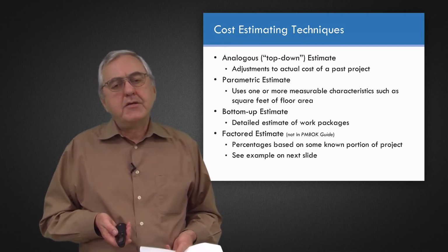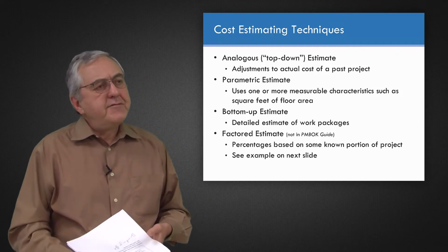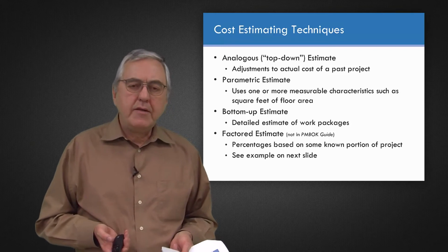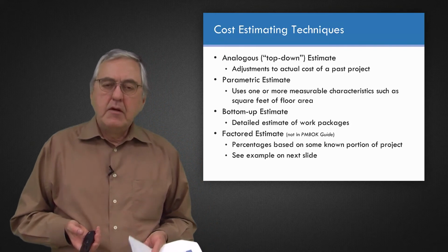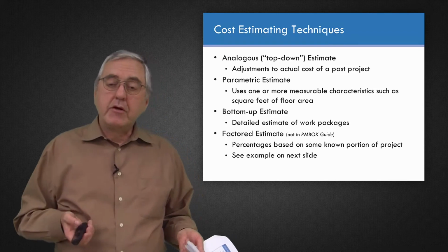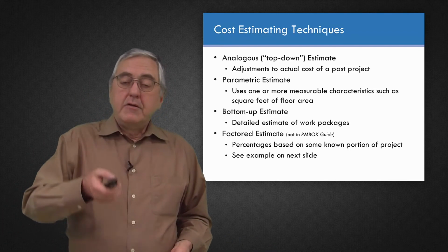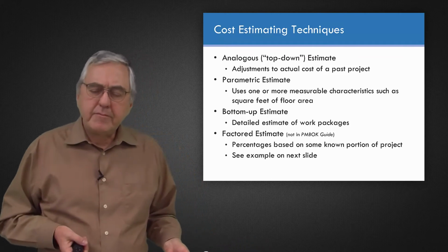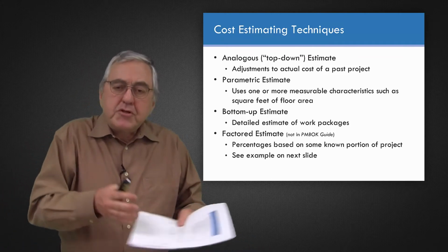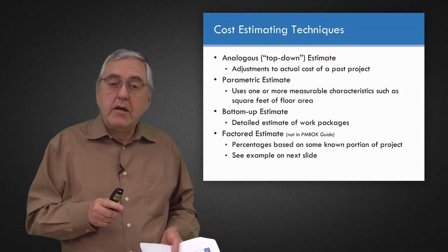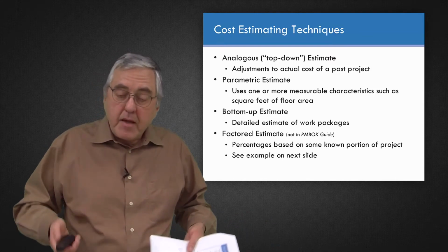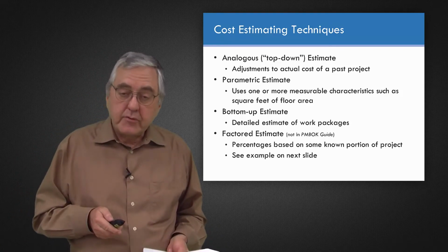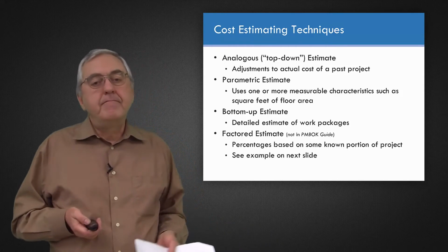Another example I see is in certain kinds of studies. There might be, for example, a Part 1 environmental assessment has already been done by you in your company, and you know what it costs you. Now the customer is asking you for a Part 2 environmental assessment. And maybe you found out from experience that if you take a percentage of that Part 1 environmental assessment, you can come up with a more accurate estimate of the Part 2 than if you tried to work it out from scratch in terms of how many hours it would take you to do it.